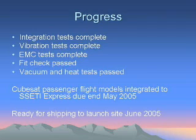Hopefully they're being resolved. As we speak, we've got 2 members of our team over at STEC sorting out some of the remaining problems there. And hopefully by the end of today, we'll have an email that will say, OK, all's go. It was due to be integrated at the end of this month. I think that's now into June, because it needs to be ready to ship in June.